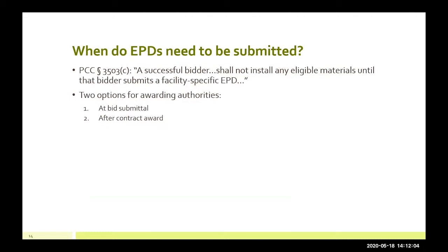If the contractor knows what material they're going to be using, then they could submit it in one package at bid submittal and have it all evaluated for compliance. And so that would work well. Or the second scenario would be the project actually takes more than 2-3 years, and so the contractor does not know exactly which material they'll be using or sourcing by then.